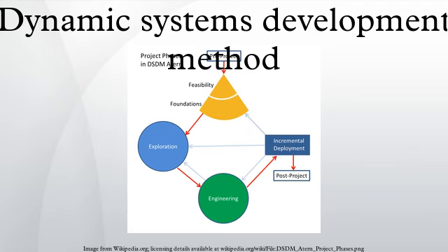The deliverables for this stage are a design prototype during the phase that end users get to test, and at the end of the design and build iteration the tested system is handed over to the next phase. In this stage, the system is mainly built where the design and functions are consolidated and integrated in a prototype. Another deliverable for this stage is a user documentation.